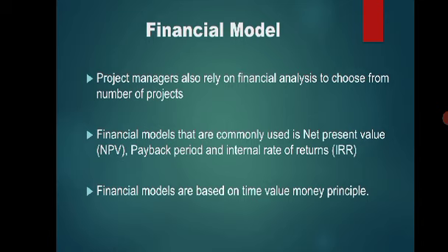So the net present value simply means that you subtract the investment outlay, or the investment amount, from the total earning, the present value of the income. And when it is higher or when it is positive, that means the project is viable. And if it is negative, that means that the return that the project will bring is less than the amount that you are spending on the project. So that's what the negative figure represents. So it is advisable not to enter into that project.